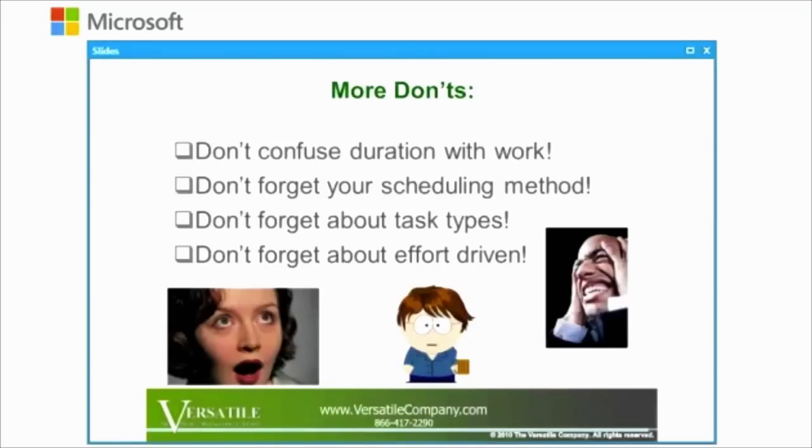One is, don't confuse duration with work. If you recall, we talked about elapsed durations and working durations. That just is how long it takes in the calendar to do work. But the work field, that was labor. Those are 2 independent variables, guys. Just be aware of that when you're working in project.